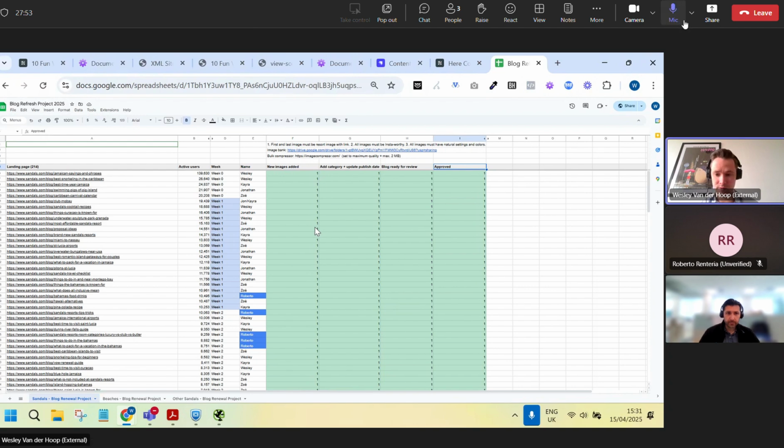Oh, sorry. We all have 40 articles to do. So let's say it takes 1 hour to make a blog article completely ready on average, which I think is on the longer side. It's probably more like 30 minutes, but let's say it's 1 hour, and we have 40 hours of work cut out for us. Realistically speaking, this is a high priority project.